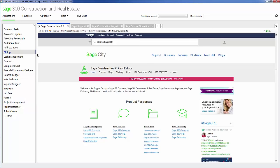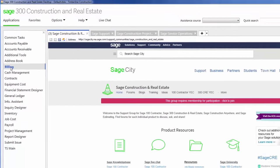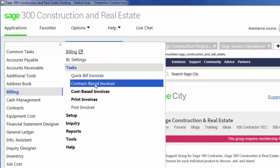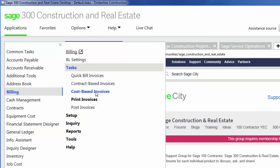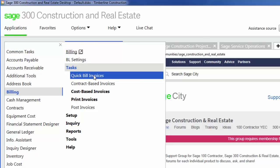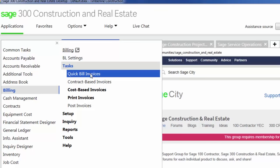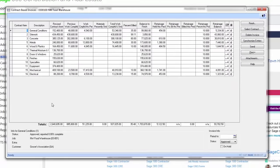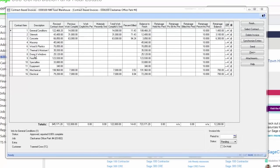Within Sage 300 Construction and Real Estate, you have a full billing package. Inside here, I can do progress-based billings, or cost-based billings, or quick bills, which are essentially quick little invoices where I write out the description and the amount. Here in contract-based invoices, I have invoices based on a schedule of values that I create within my contract. I can also have the contract hold retention based on information that I set up. I can also decide to bill based on percentage or total amount.